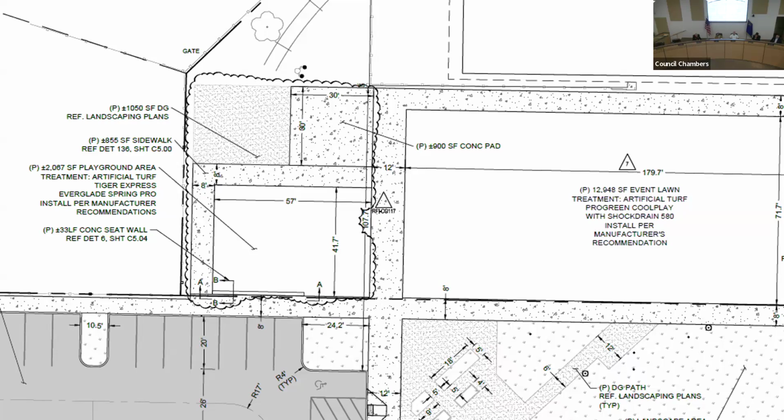We thought we were putting grass and trees, and now we're doing artificial turf and fake coverings, or I'm sorry, metal coverings. Okay, let me clarify. We never thought we were going to put in real grass. It was discussed, just as real trees were discussed in the design phase. We all decided artificial turf, and it was put on the civil engineering plans, artificial turf to be installed by others. When it was integrated into the final plan set, it never got changed to artificial turf.